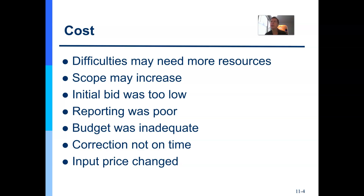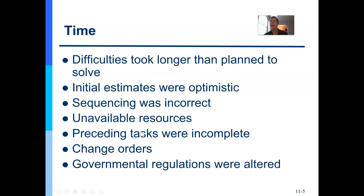Keep in mind you want to control scope creep. Remember the triple constraint — if I change one side of the triangle, the others will change too. If scope increases, it will lengthen my schedule and increase my cost. Maybe you bid too low; back to the resource management conversation, you want to make sure your bid is accurate to include your profit margin. Reporting is a key part of the control piece — what data do you draw, how often, in what format, and how do you present an executive summary to decision makers in a timely, proactive way.